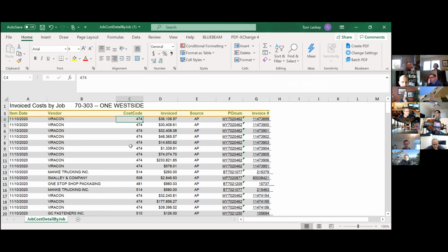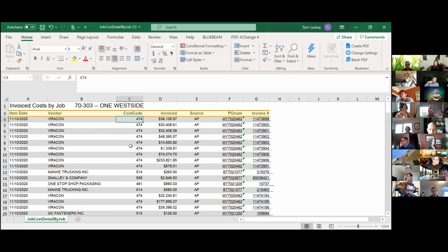And then what you want to do is, once all that's complete and everything's organized correctly with the sums, you're going to want to save that in a folder. We're going to figure out where to put it. It's probably going to be in that G703 folder. You're going to label it, you know, this month. So you're going to want to label it like November billings. So you have a record to go back to next month, and see where you left off. So Tom left off on the 10th. Everything past the 10th on the next billings, you're going to account for.